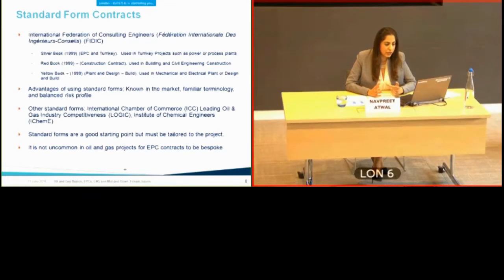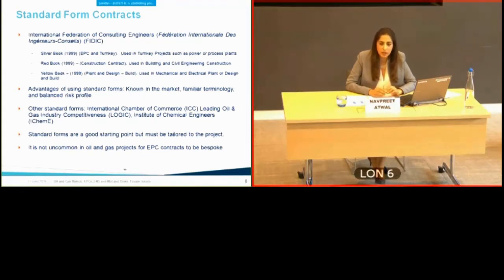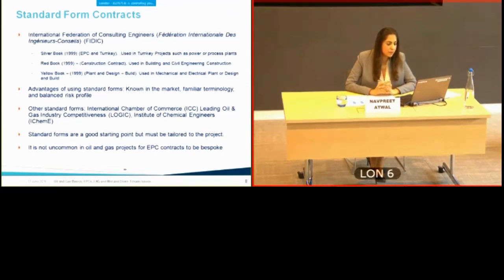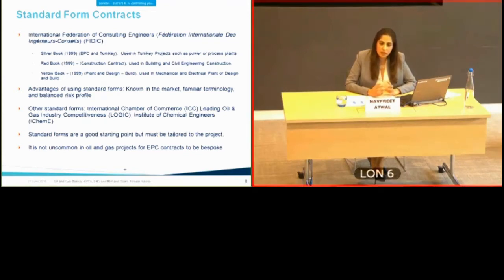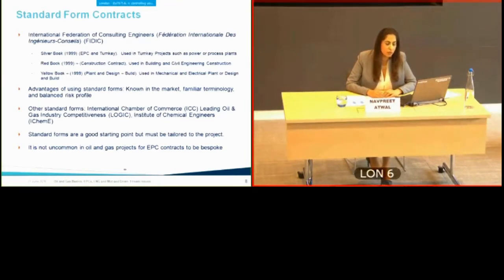The risk profile in each FIDIC book changes — in the silver book, the contractor takes on a significant proportion of risk. Standard forms are a great starting point but need to be tailored for the project. Because owners and lenders amend them so significantly, it's not uncommon to have bespoke EPC contracts in oil and gas, and there's a current trend away from standard forms toward more bespoke contracting.